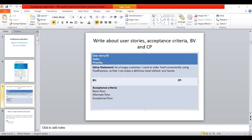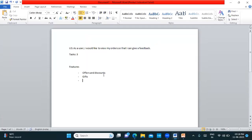Business value is the importance given to a user story. When working on an Amazon application, we would first work on features like offers, discounts, gifts, and festival or holiday specials — because those are of high business value to the customer. By delivering features in small periods, the client can give them to end customers and start generating revenue. Depending on the importance of the application, we prioritize and work on those user stories accordingly. This is called business value.